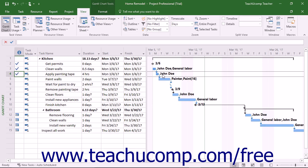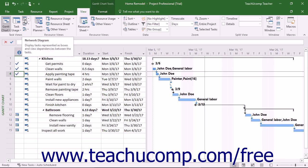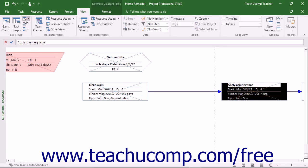The Network Diagram view displays the tasks within the project in a flowchart style. You can switch to this view by clicking the Network Diagram button in the Task Views button group on the View tab in the ribbon.